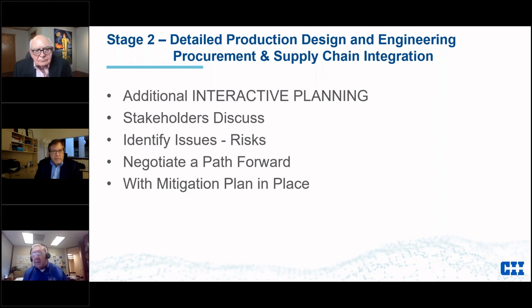So our biggest challenge is to get the designers the vendor data they need in time to do their portion of the project. And that goes all the way back to that milestone planning thing I was telling you about. 17 steps to buy something. Can I whittle that down to 8, 9, 10? Can I compress the durations from 10 days down to 2 days? What can I do there?